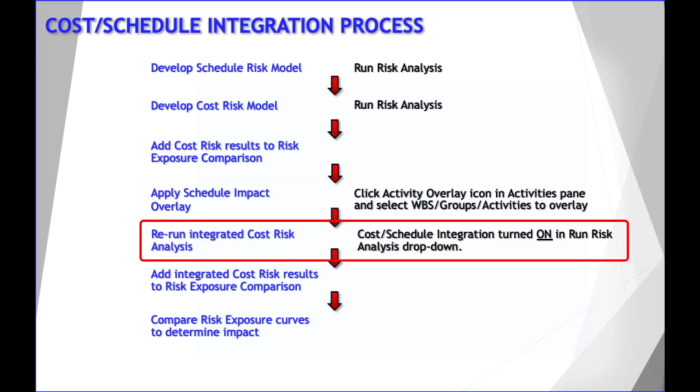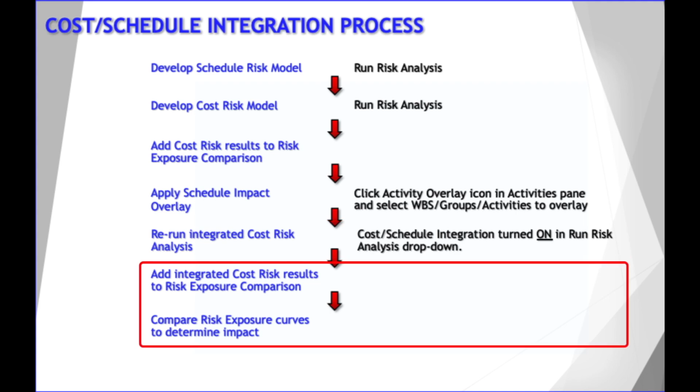Then rerun the cost risk analysis with the cost schedule integration turned on in the risk analysis options. Add the integrated cost and schedule results to the risk exposure comparison to view the additional impact of schedule risk exposure to the cost risk estimate.